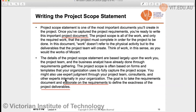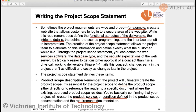The scope statement defines the exactness of project deliverables. For example, if you have to create a website that allows customers to log into a secure area, that requirement defines the functional attributes of the deliverable — the intricate detail and behind-the-scenes programming. Through the project scope statement you can define the web service software, the database type, and the security expectations of the web server.